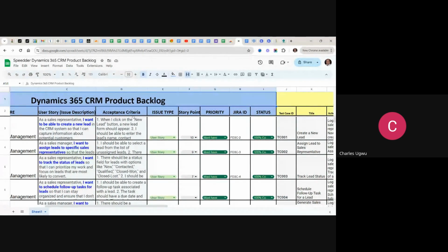While working on the user story, you need to state whether the issue is a user story or a task. A task is other work that can be performed while implementing a solution. A user story is a small piece of software, but there is other work that can be done that is not a piece of software, but contributes towards producing that smaller software called a user story. A user story is what a software does from the point of view of a user, how a user is going to use a simple software in a product. That's what we call a user story. We tell a story of how the user is going to use that tiny software.